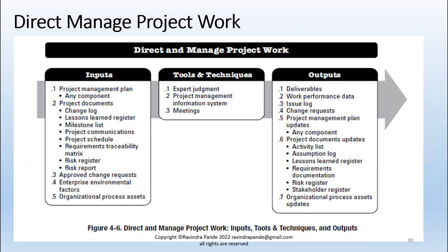These also include the test cases which validate the project feature functionalities, who test these product features or functionalities, as in trying to check if they exist and function as mentioned in the requirement. So all this long table is basically the requirement traceability matrix, which is normally updated and validated or verified in the process of directing and managing project work.